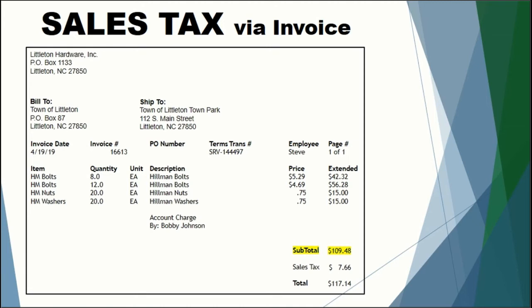And sales tax is something else we'll want to discuss briefly. This is an example of sales tax with a general invoice. These are pretty simple because most of the time you'll see all of your items itemized, a subtotal, your sales tax itemized, and then your gross total. Now, what you'll use is the subtotal figure on your DER and reimbursement request, because PARTF does not reimburse for sales tax.